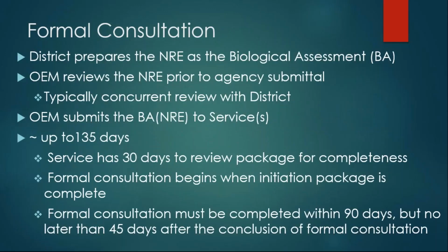For formal consultation, this is going to be required if we end up with an effect determination of may affect, likely to adversely affect. The district or the turnpike prepares the natural resources evaluation as a biological assessment.